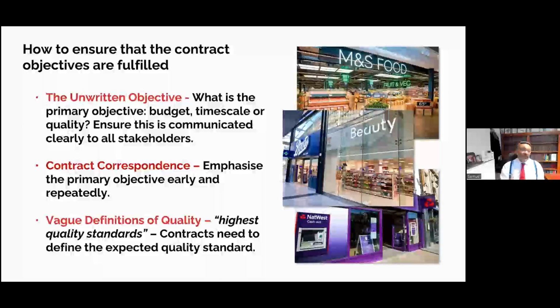Again, I see definitions where one looks at papers and you say that the project is to be built to the highest quality standards. What does that actually mean? Not much, to my mind, because every single project ought to have clear-cut specifications identifying exactly that which is to be delivered. Now, if you say build this to the highest quality standard, it doesn't mean anything. It's ambiguous. It causes difficulty because it may well then become subjective rather than objective.